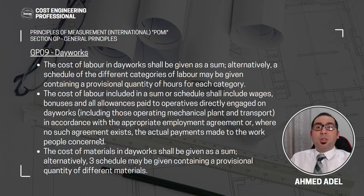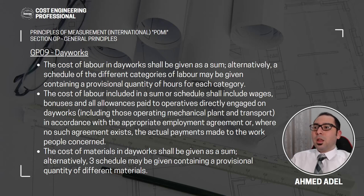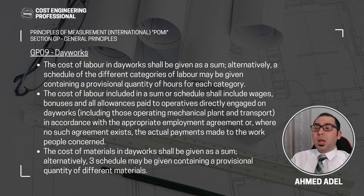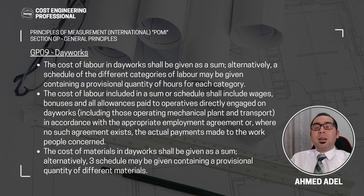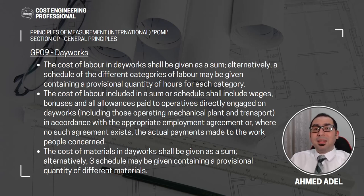If you don't have a contract with your labor — if you are hiring labor on a daily basis — then the actual payments made to those people who will do the work is the rate you should keep in the day works. The rate you put is exclusive of overheads and profit. Day works facilitate variations or extra work the client asks for that is not part of your current contract — you won't need to agree prices from scratch because the day works already include labor, materials, and plant rates.